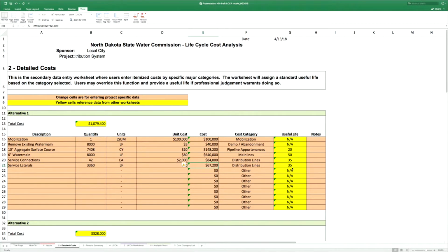And then at the end of 50 years here, we're also assuming a salvage value on equipment and infrastructure. So 35 years minus 50 leaves you 15 years of depreciated value, or actually no, it's the other way around here. So 15 years of depreciated value we're taking off of the rehabilitated pipelines, and then we're factoring that as a salvage value on the life cycle cost analysis.